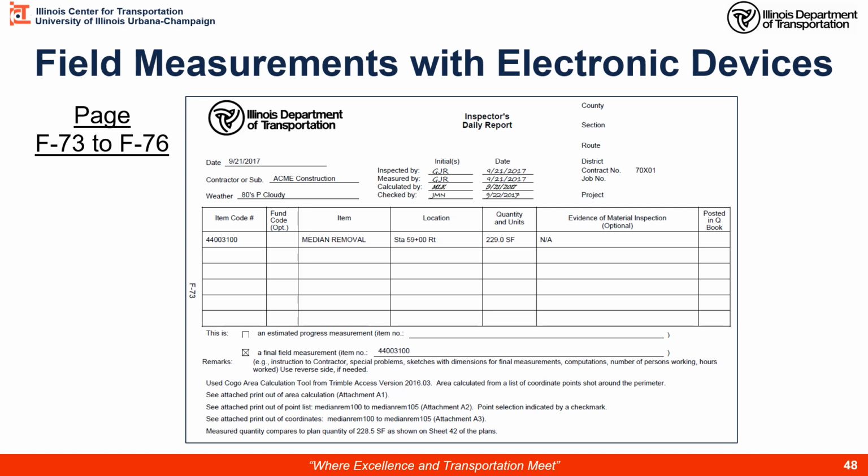The general rule for IDOT, since we don't have specific spec guidance on electronic measurements, is that for devices used for electronic measurements, one, you must show sufficient documentation that it is calculating the area correctly and that a checker can check it. And two, they have to be able to meet the minimum accuracy in section B of the DOT guide for individual measurements and final calculated quantities.